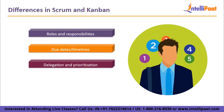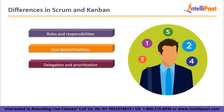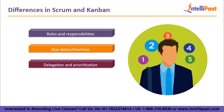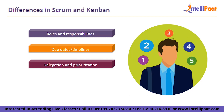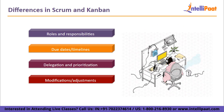Regarding delegation and prioritization, Scrum employs a pull system but each iteration involves pulling the full batch. Kanban uses a pull system or structured workflow to limit team members' ability to pull new tasks until completion of the current task. Changes made during the sprint should be avoided at all costs in Scrum, whereas Kanban permits modifications to be made to a project mid-stream, allowing for iterations and continual improvement before the project is finished.